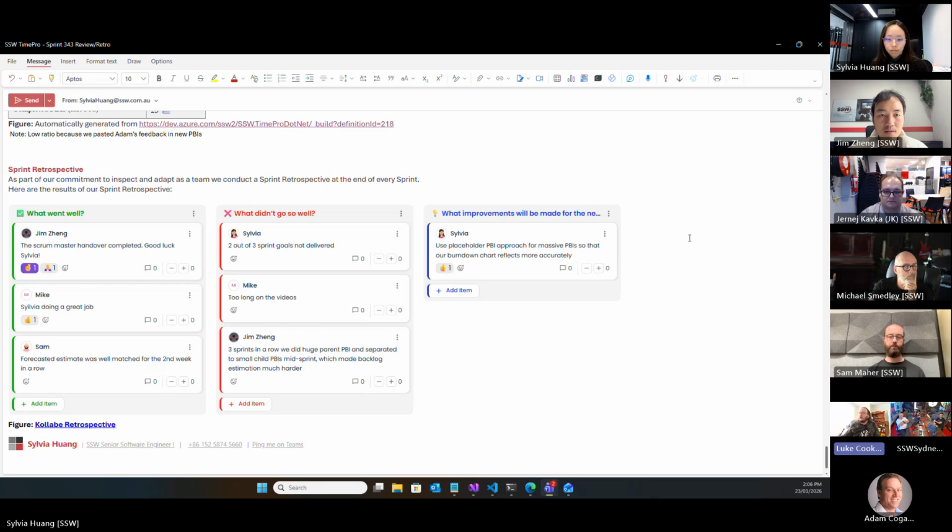They're recording that next version, getting it reviewed by you, and then we get some extra improvements that need to be done. But the video being reviewed is happening so late in the sprint that there's not enough time to create all of the PBIs that they need for each individual point of feedback.